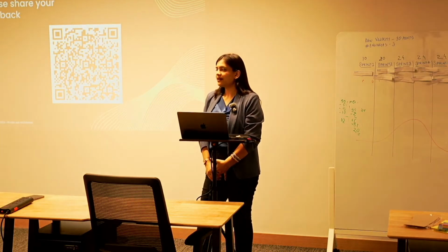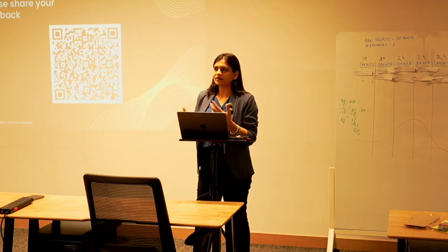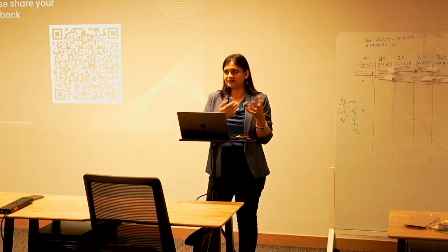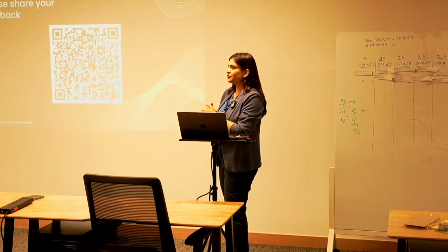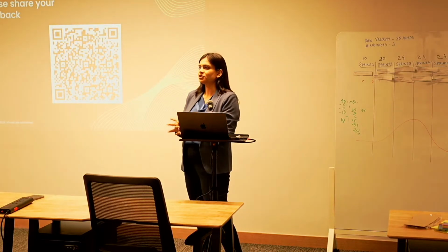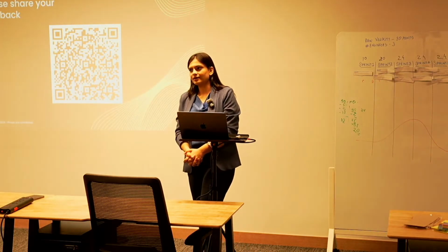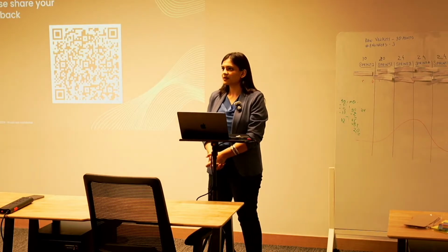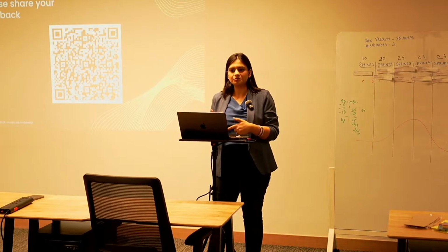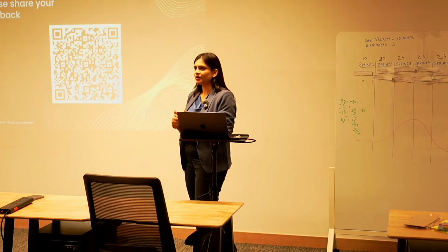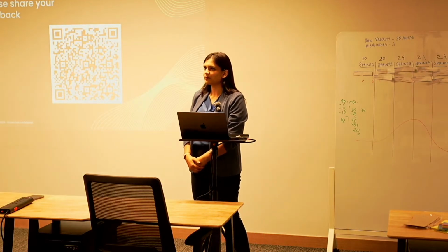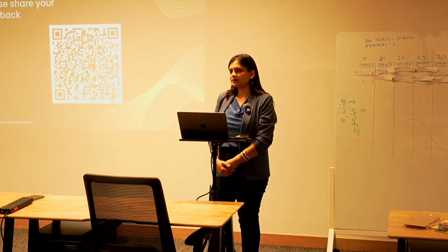But at the very start, I think till you don't have an MVP, is it worth releasing to the public? Of course, you can release to production, have it canary tested like we were talking about. But to the customers, that initial MVP that you need to launch requires collaboration. But once you are in the cycle of releasing frequently, we really recommend continuous increments of 2 weeks, 2 sprints, based on whatever works for the team.